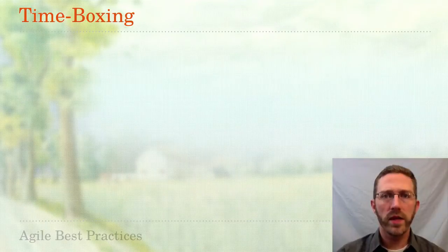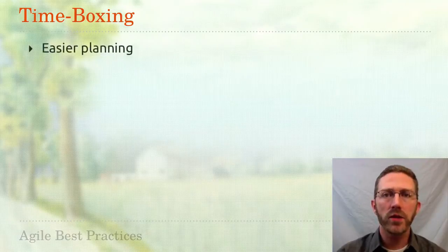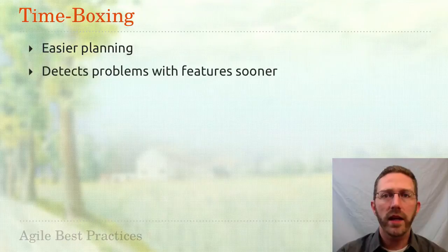Situations like this are the reason Agile methodologies require iterations to be of a short, consistent duration. It reduces miscommunication during the planning process. If there's problems with the selected feature set, it helps to detect them sooner. Maybe that extra dialogue isn't needed as badly as originally thought.